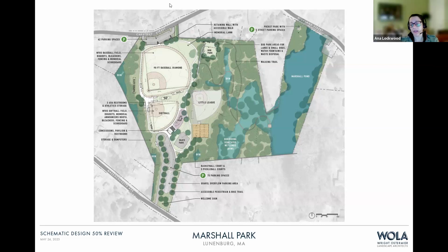Yeah, so what I was going to tell Tom is that we are in the first phase of the engineering, the large scale design. And there will be a next phase where we start deciding on the smaller details of engineering, such as double sink or single sink, automatic doors for the bathrooms or not. But that would be decided and talked about in the next phase.